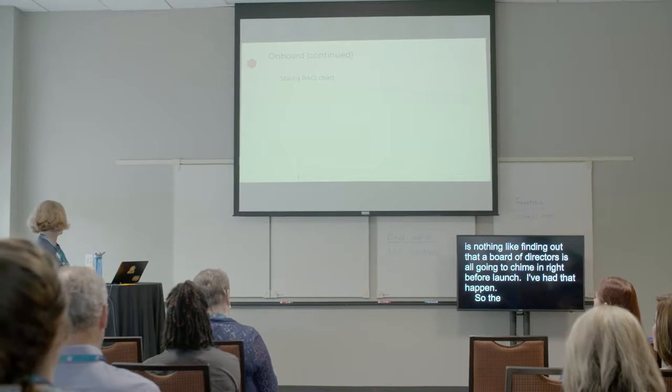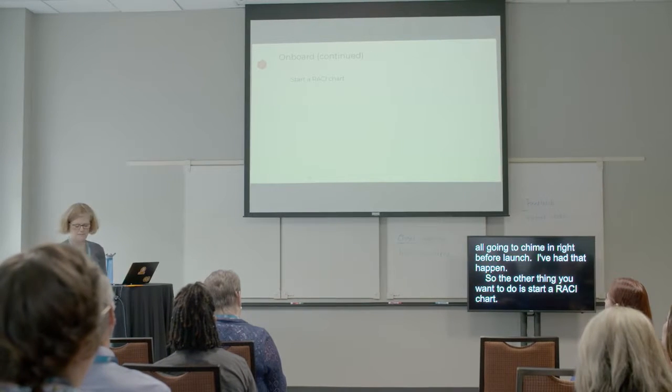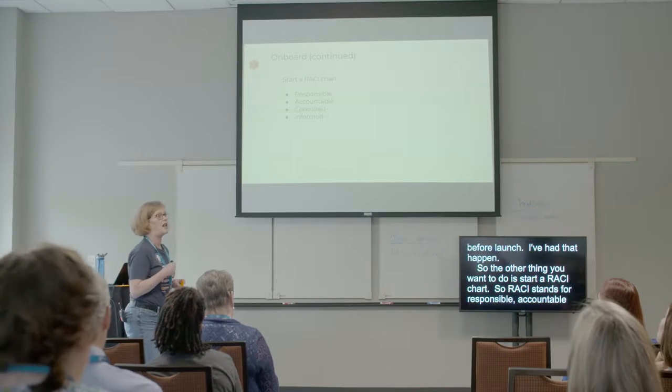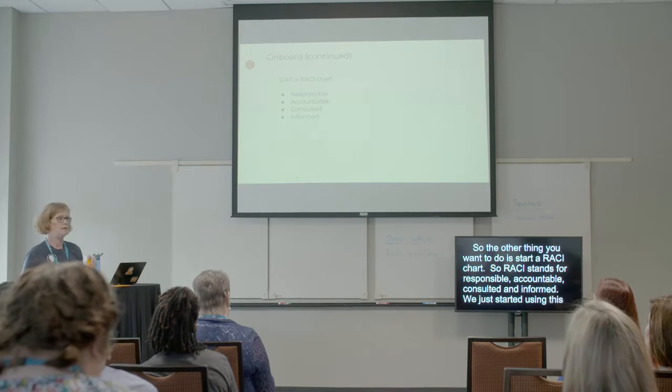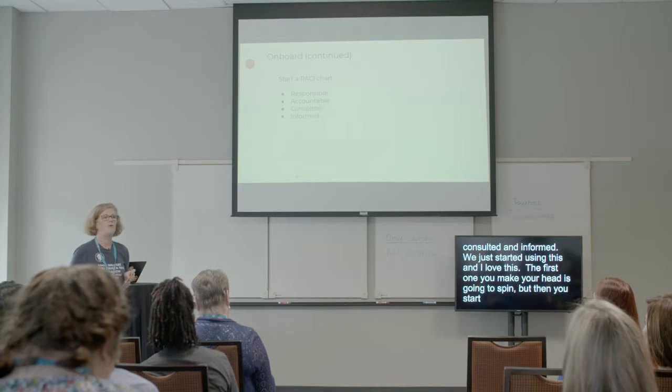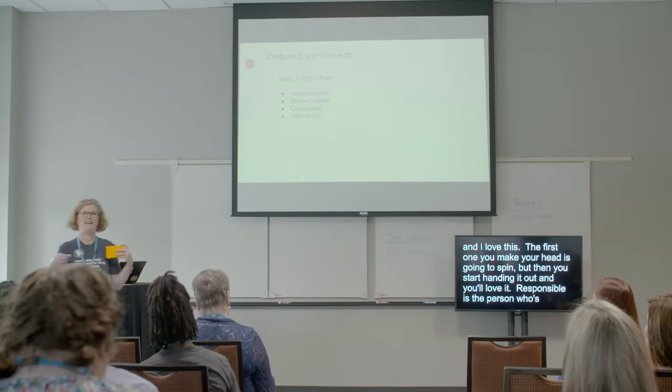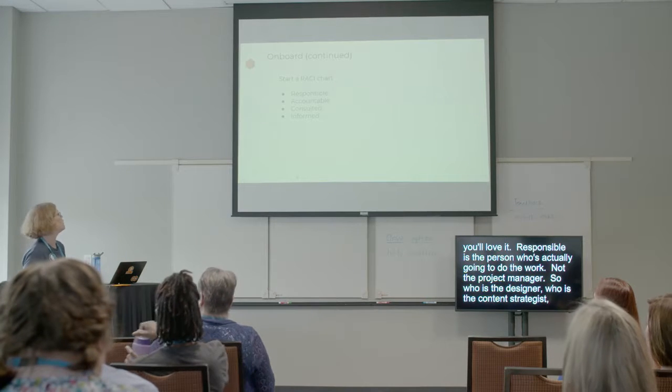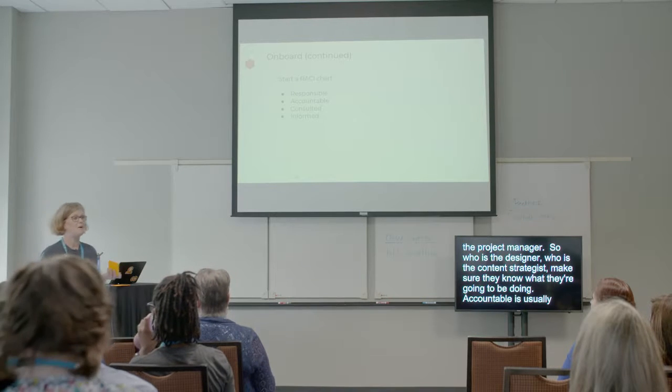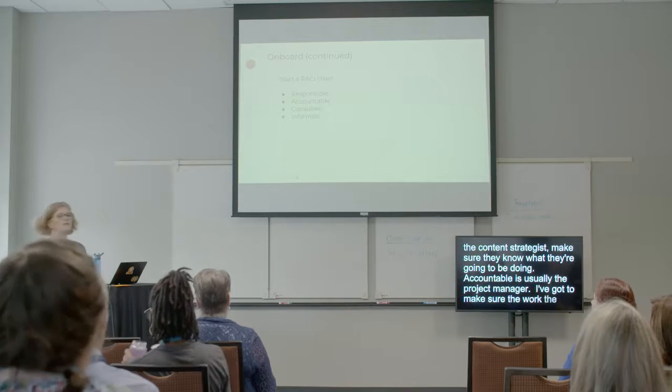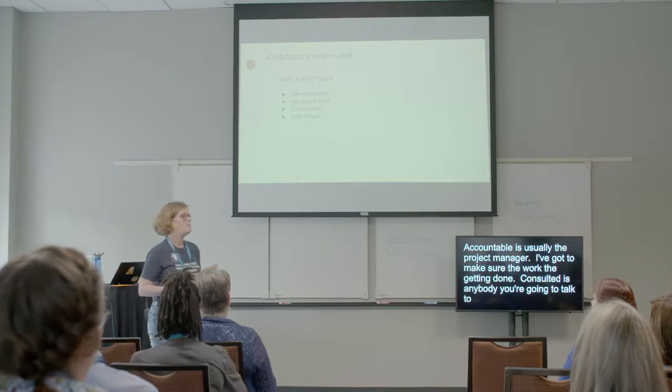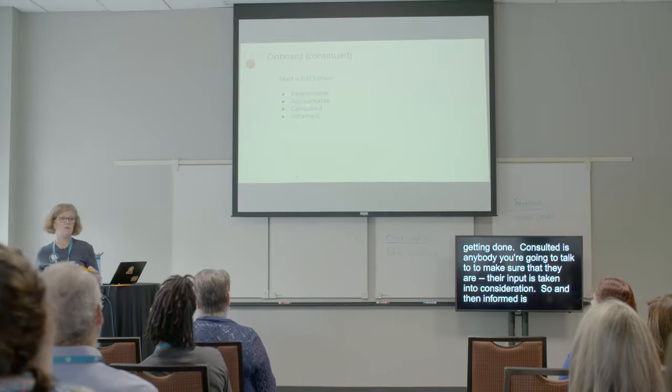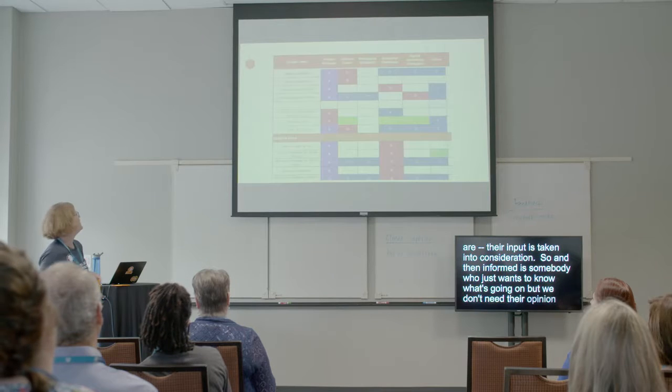The other thing you want to do is start a RACI chart. So RACI stands for responsible, accountable, consulted, and informed. We've really just started using this and I love this. The first one you make, your head's going to spin, but then you start handing it out and people love it. Responsible is the person who's actually going to do the work, not the project manager. So who is the designer? Who is the content strategist? Make sure that they know what they're going to be doing. Accountable is usually the project manager. I've got to make sure that work is getting done. Consulted is anybody you're going to talk to to make sure that their input is taken into consideration. And then informed is somebody who just wants to know what's going on, but we don't need their opinion.